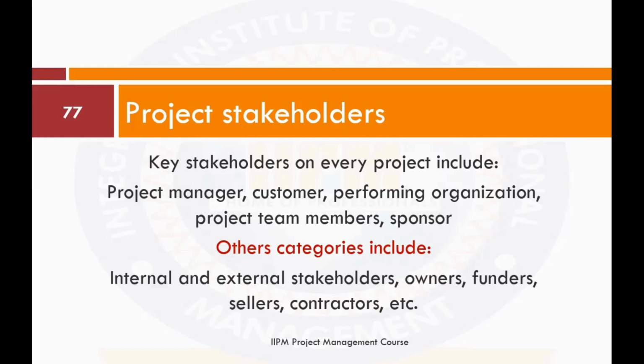All right. So you have to define what those impacts are. Why do we need to define the impact? It is for whoever is at that point of engagement with the stakeholder to know what the impact will be if he or she does not manage those people very well. And that is part of communication. Then the next thing you want to have on that list is strategy for managing those stakeholders.